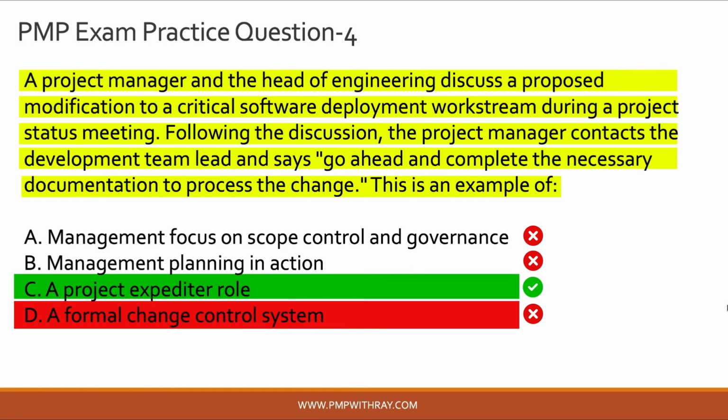So it is the role shift which you need to understand, okay? Not the job title. The key characteristic of this expediter role is not decision making authority, okay, but it is a role which simply acts as a communication link, carrying the decisions made by others and passing instructions and communications downstream.